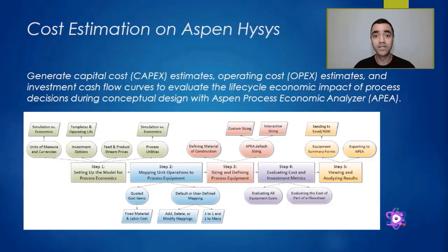The first thing to consider before using the Aspen Process Economic Analyzer is to set its database. The first thing that we have seen is that the values informed in the software are in US dollars, in the US. When we consider that the project will be installed anywhere outside the US, the values or the cost estimation will be different. The second thing is that you need to verify what is the accuracy of the results.